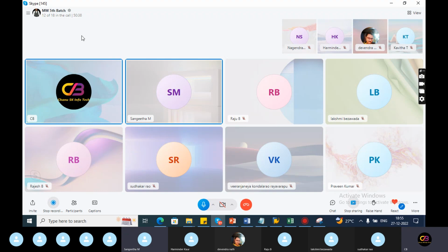ECC is a documentation phase which needs to be done. In S4 HANA, it is already predefined and guided configuration information we have. So the main documents which come under operation level would be the AS-IS, which will be shared by the client, the TO-BE, which needs to be prepared by the SAP functional consultant, like how we are going to map into the SAP system, and the gap analysis document.